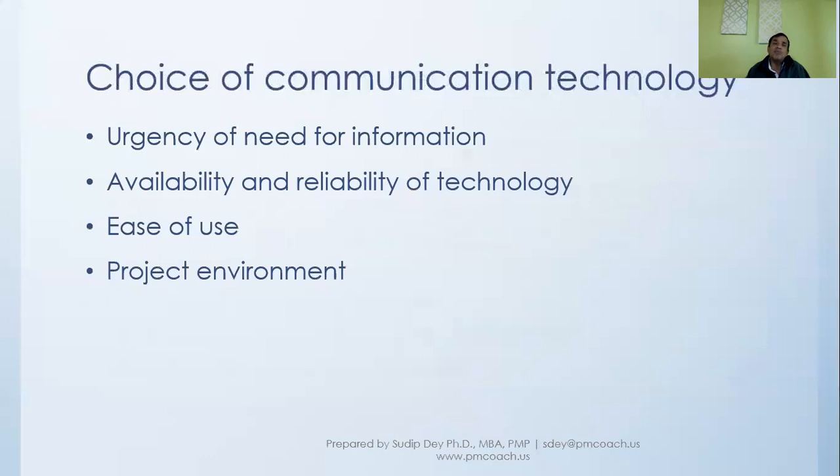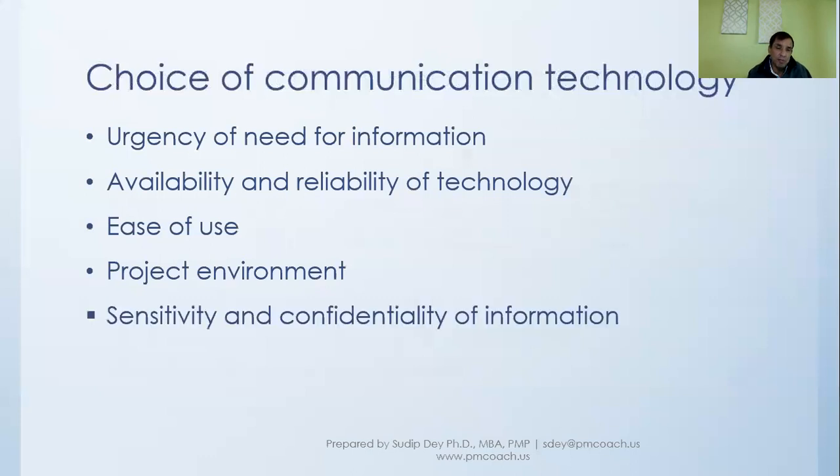But if the project is dispersed geographically, with different team members in different places, in that scenario there will be a lot of audio conferencing, a lot of video conferencing, and a lot more electronic communication in use. So it depends from project environment to project environment.